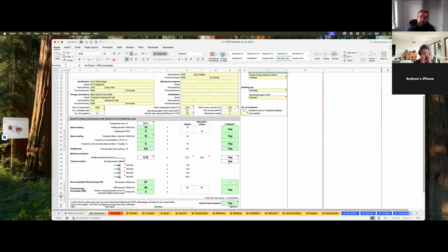Now, the next stage, as far as I'm concerned, is I will send this to a Passive House certifier and get you a price. Around $5,000 for the whole process is what they seem to be running it at the moment. Yeah, sure. Okay. That's broken up into three sections: the initial review, the pre-construction review, and then the post-construction review.